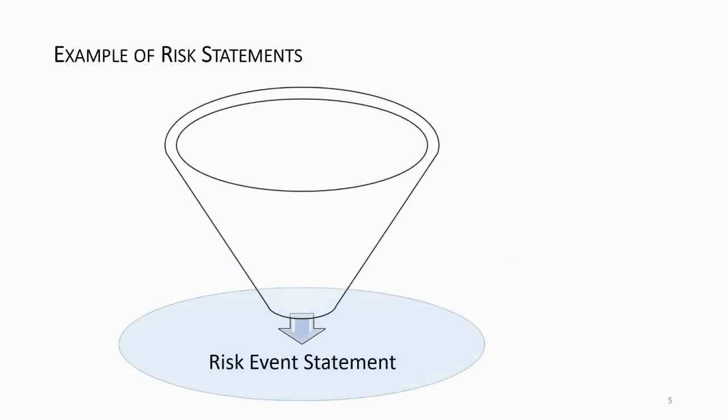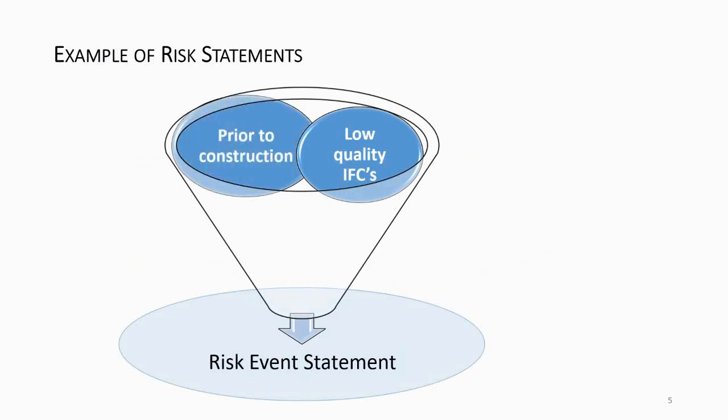Low quality IFCs is the event itself. When issued prior to construction, the impact is numerous RFIs and delays to the actual project.